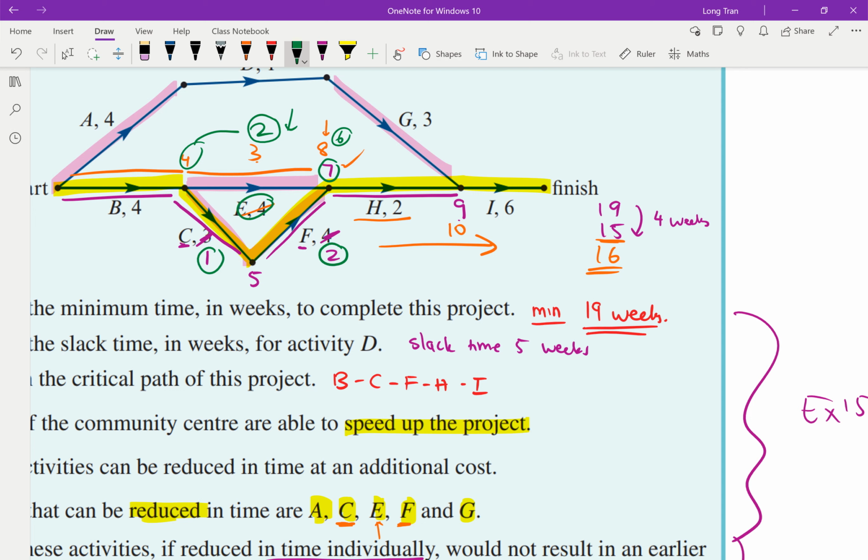See what I mean? So one of the aims, actually, is that the tip I would usually give is try to make as many critical pathways as you can. And what I can see is if I reduce E down to 3, that will now have 7 as my main critical path, and this whole entire line also becomes a critical pathway as well. Okay, now notice here, once I've got that sorted, I look at, well, 7 plus 2 gives me 9, right? I'm going to circle this.